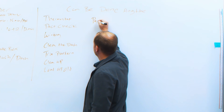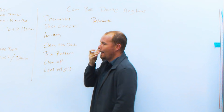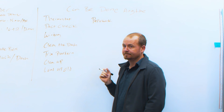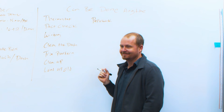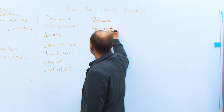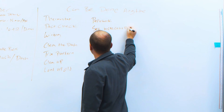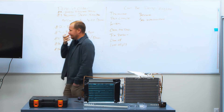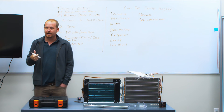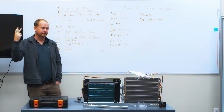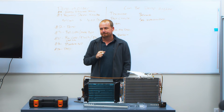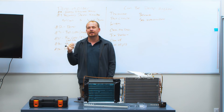Paperwork has to be done before you leave the job site. Setting the inspection date with the customer can be done anytime. The second half of the process includes: pressurize, pull a vacuum, bubble test your joints while pressurizing — not during vacuum, that doesn't work — then charging the system. We talked about weighing in based on line length. The new app with the refrigerant charge calculator should be up this week.